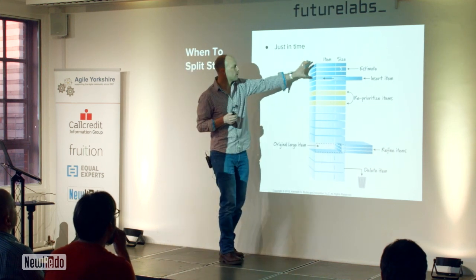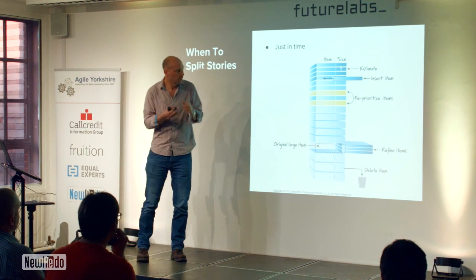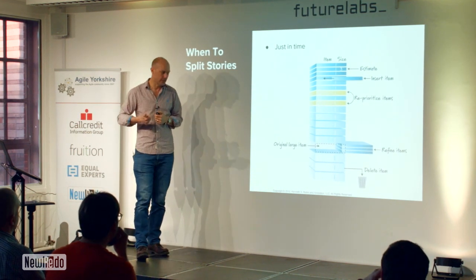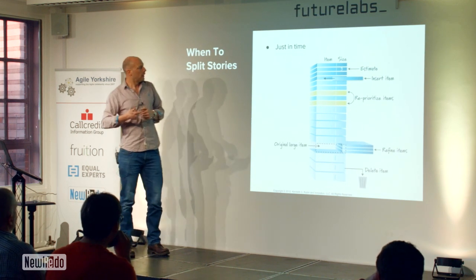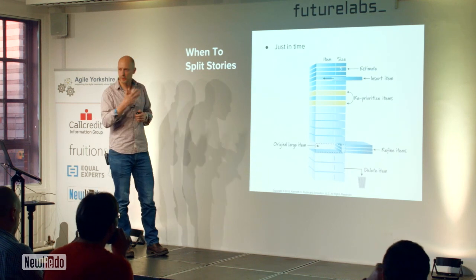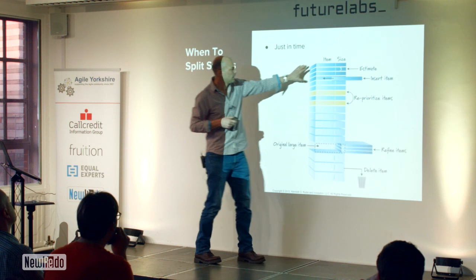The stories near the top are smaller because those are the high priority ones. Those are the ones you're focusing in on. And so you've worked on them, you've split them down some more. So they've become better specified, they've become smaller. They've got test criteria against them, all those sorts of things. They've become more INVEST-y, I suppose, up towards the top.